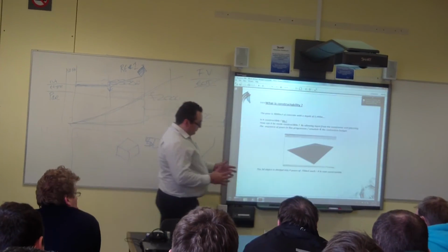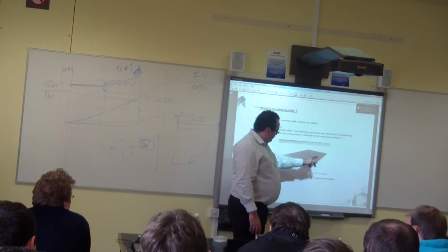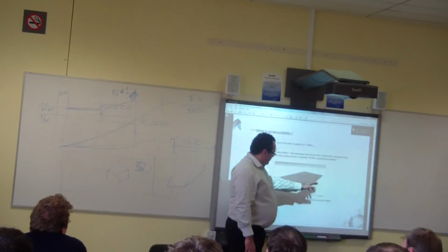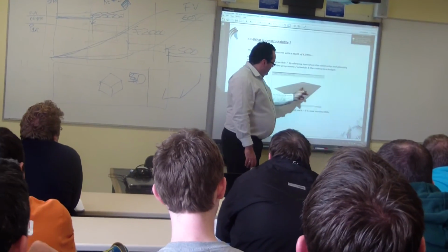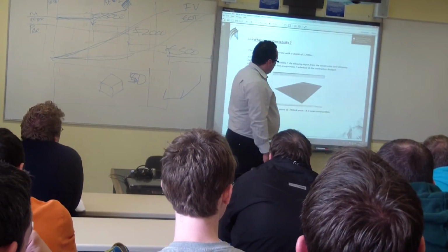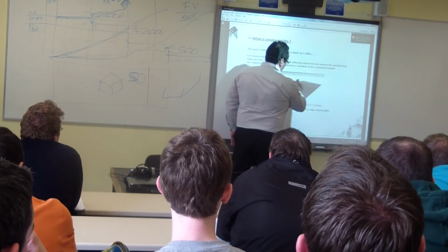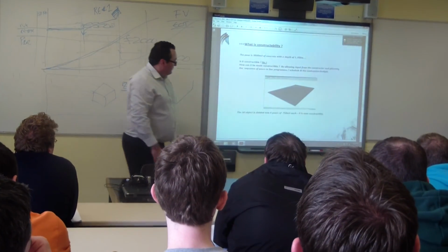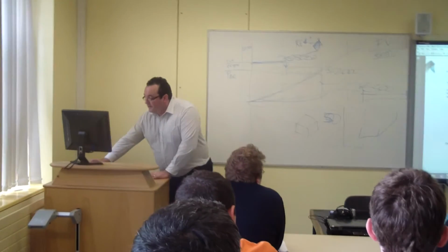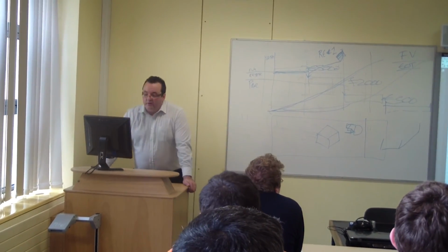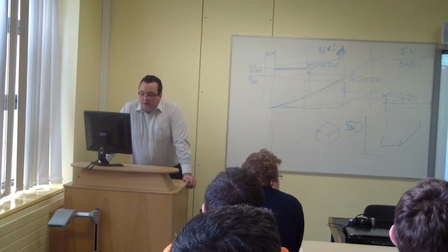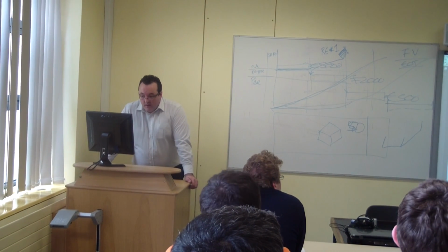So what I do, talk again, in checkerboard fashion, right? So we're going to pour that one there. This formwork goes there, we're going to pour this one here, across there because it's less formwork. And then you go over here and pour that one there because it's less formwork, and then that one in there. And you have some sort of ruling around there as well, like, you know, if it's a basement construction, for example. So a BIM can be used to produce accurate 5D BIM cost management data derived from the BIM model. A pre-construction